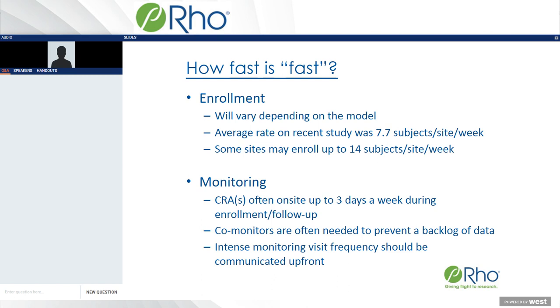So it is a lot of enrollment, very quickly moving, and the impact most directly or most immediately is the monitoring. And when we talk about fast-paced enrollment, it goes hand in hand with fast-paced monitoring. And so resourcing is pretty critical to plan from the very beginning. In these studies, we are often seeing CRAs on site 3 days a week, every week. And we are often having to have co-monitors accompany those CRAs just to keep up with the rate of data that is coming through review of casebooks.